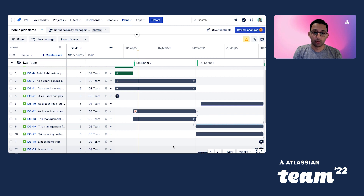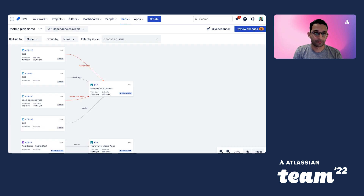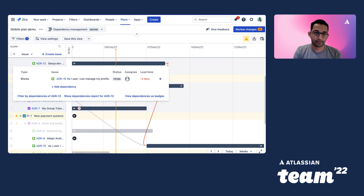There are also scenario modeling features which help you visualize the impact of different team velocities. Whether it's due to capacity constraints or specialization, you'll need to manage dependencies across your project. Advanced Roadmaps has multiple out-of-the-box dependency views to help you keep your project on track. The dependency report provides a full map of all your dependencies and smartly displays any dependencies that aren't scheduled to be ready on time. There's also the dependencies management view on the roadmap, which provides a filter of projects that have dependencies. The lines show work items connected by dependencies; hovering shows the lead time between the work items, and any that aren't scheduled to be ready on time are illuminated in red, helping you stay on top of the risk to your project. Here we can see that this issue is scheduled to be completed three days after another issue that is dependent on it is scheduled to start.